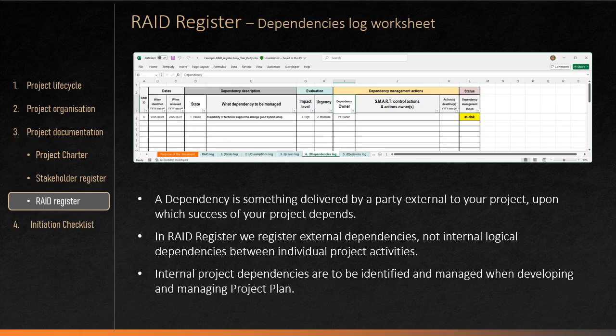For example, a project may develop a new product, but the commercial success of that product will depend on the sales organization being ready and motivated to sell the product. That is why dependencies must be identified, assigned to owners, tracked, and escalated when needed.